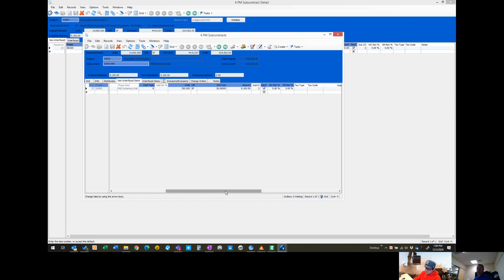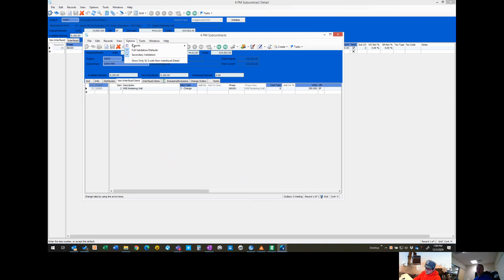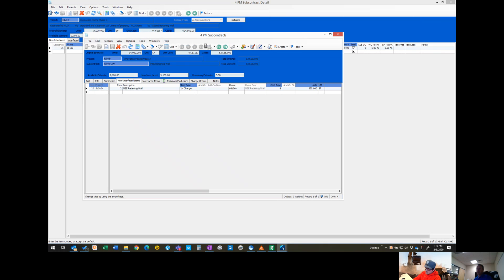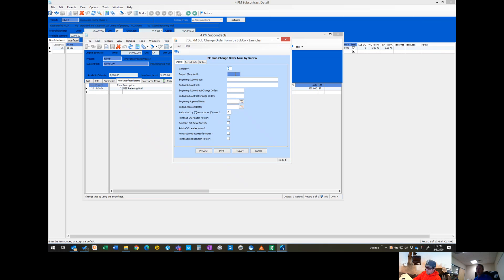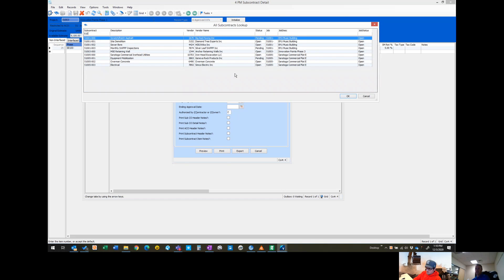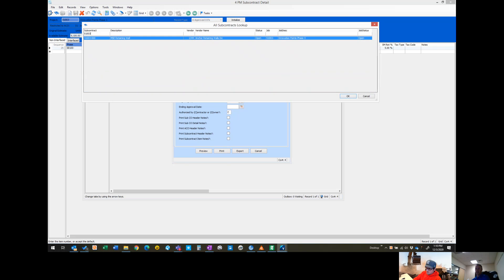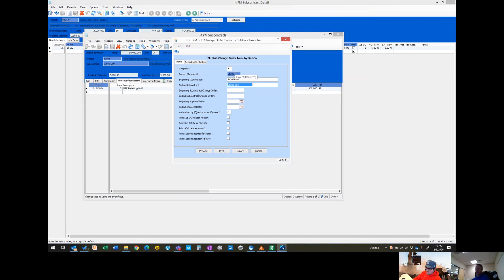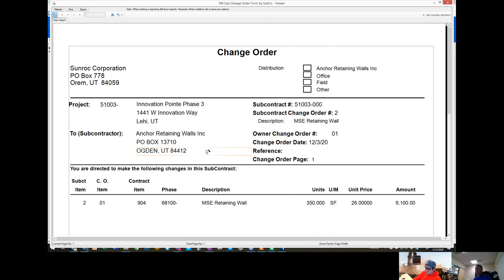From here we can come into this report and there's a PM sub change order form. We just have to type in the project number, the subcontract that this is associated with. If there's only one, you can leave these all blank, and we're just going to preview it. I'm not even going to check any of these lower boxes.